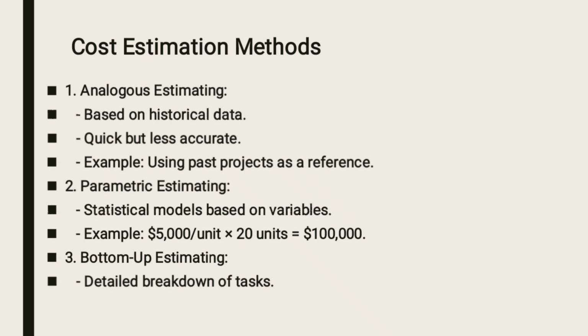The third one is known as bottom-up estimating. Here you break down the whole of your project into small tasks and each task will be assigned a budget. This one is more accurate because you are focusing on the tasks, but it is time intensive.